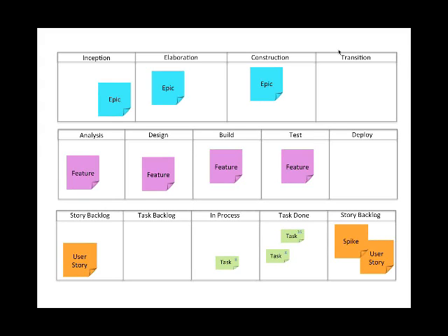Now the discipline is that when you have a bottleneck within your system, there's only certain things that you can do with it. You can elevate it in the sense that maybe we give it more resources. We can subordinate it in the sense that we make everybody else go slower to balance to the constraint, or we can exploit it in the sense that we take everything off of it to be able to make it go as fast as possible.